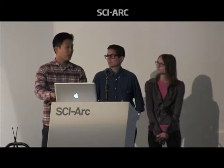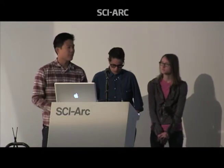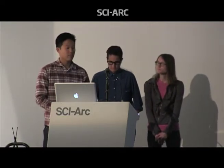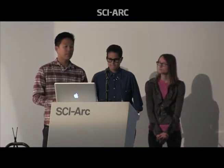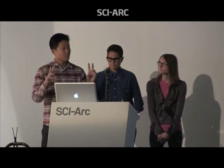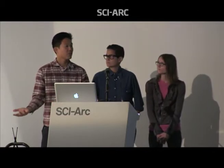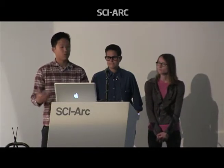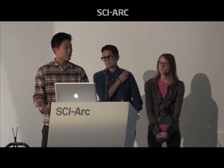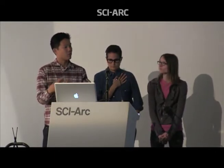Right now I'm doing a lot of the drawing set and the animation stuff. Caltech is working with all the technical, electrical, MEP components. As time progresses, everyone has their specialized roles. Right now every student essentially has their own little baby projects. For example, the moving cabinets, 4 students are on that because they've designed it from the beginning. They have to take care of the material takeoffs, order the material, find out how to weld it, put it together, use the wood shop if they need to, and get it done. So everyone is taking care of their own little projects.